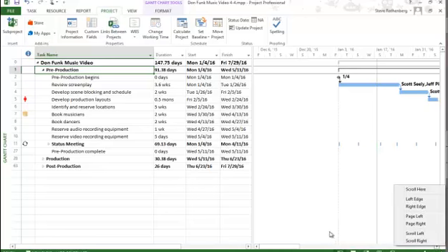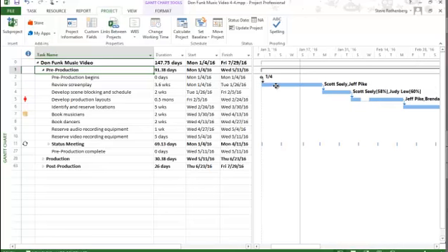These arrows, let me slide this over. These arrows that sort of stair step between the tasks mean that this task must finish before this task can start, and this task must finish before that task can start, and likewise. This little area here means there's been a split. There's no work being done on that particular day, maybe because the person's on vacation or for some other reason.